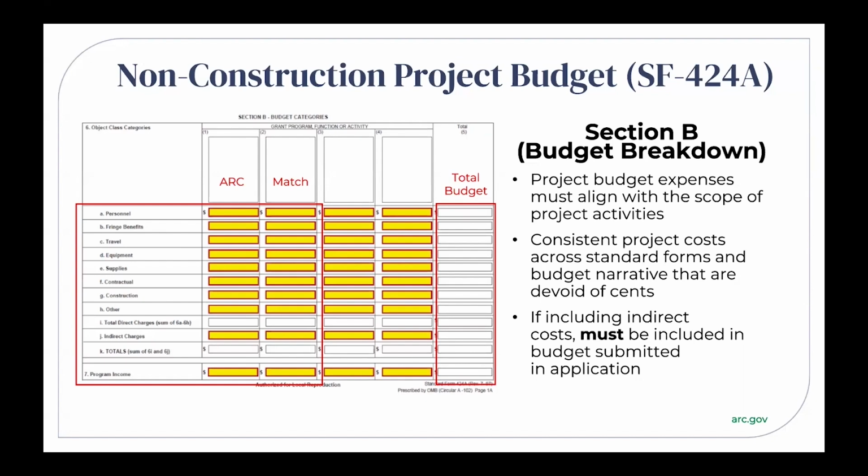Please ensure that your project costs are consistent across the standard forms and budget narrative, and please round to whole dollars. Do not use cents. If you're including indirect costs, you must include this in your budget forms that you submit.